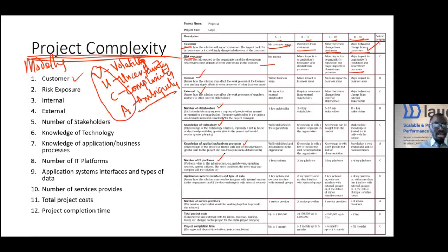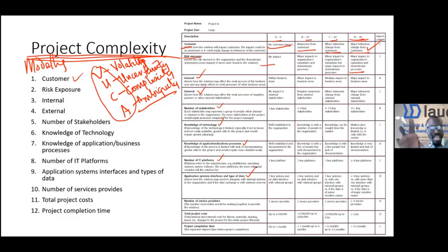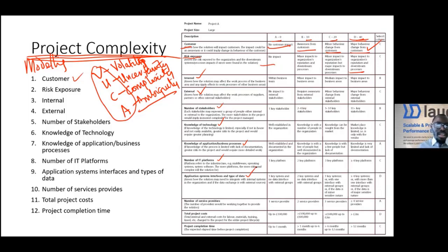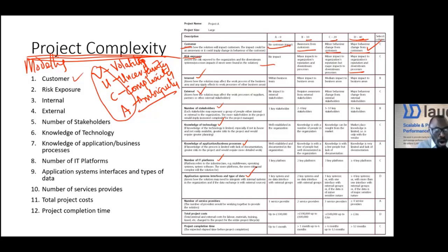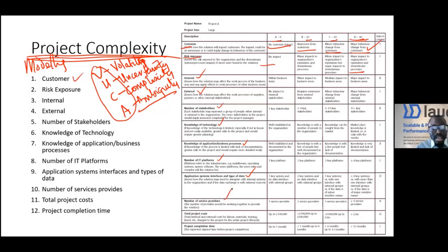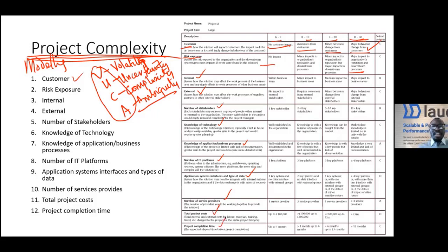The number of application system interfaces - all of these APIs. How many APIs do we need to call into our new application? The more the number, the more complex the project will be. Also, the number of service providers, the total cost of the project, and the timeline of the project.